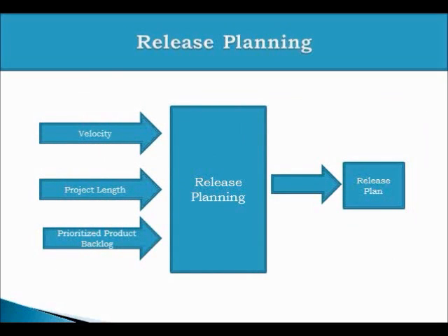So what is release planning? If you talk about it in an input-output or process format, release planning takes an input of the team's velocity. It takes an input of the project length. It also takes an input of the prioritized product backlog, and on the basis of these three inputs, it produces a release plan which guides the Scrum team during their release time period.